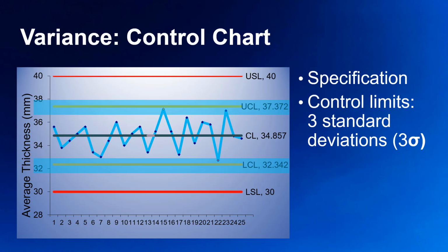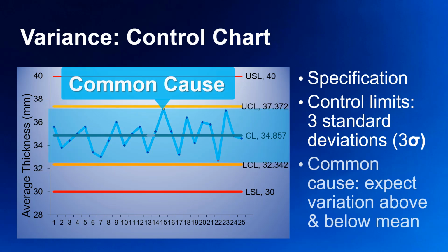These give our project team an internal range. If any sample measurement goes above or below our control limits, we may need to consider an intervention. Among our samples, we expect some variation both above and below the mean due to common everyday causes. Experienced operators make occasional errors. Machines have fluctuations in ambient vibration, temperature, or electricity. Air has minute levels of dust and contamination that can affect the samples.